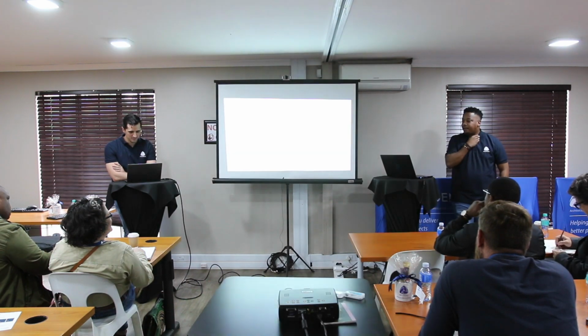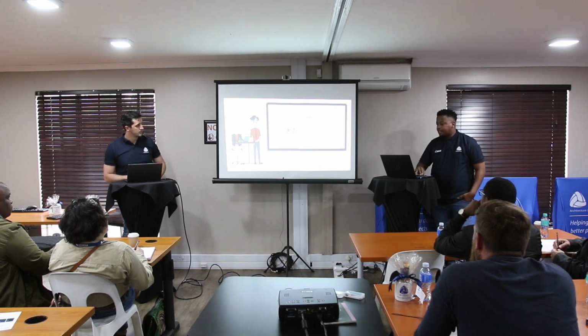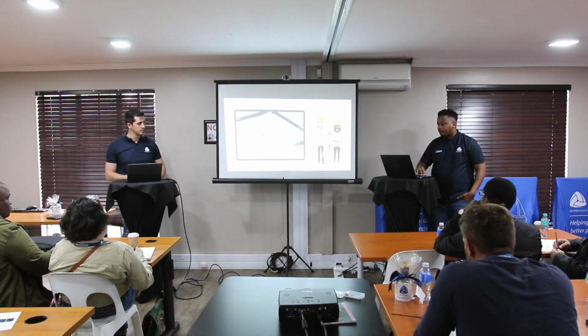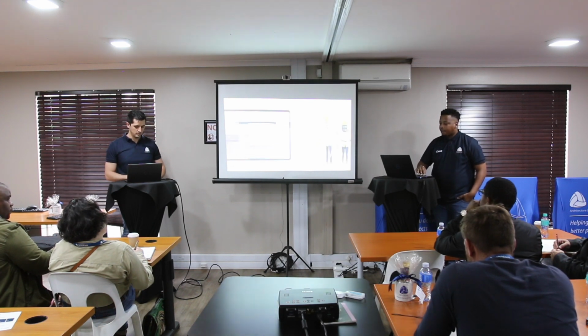Okay, so progress tracking. The term progress tracking can mean a variety of things, right? You can track material, timesheets, tasks, installation, etc. In Autodesk Build, it focuses on tracking installation activities in projects as a percent complete or quantity of materials installed for a given project and location, right? The information keeps office teams aware of progress in order to analyze and update plans and stay on schedule. It also empowers field teams with productivity forecasts, which help to organize future work and the arrival of different trades on site.